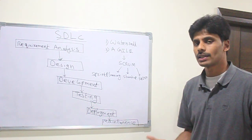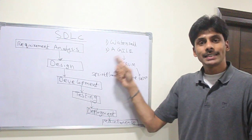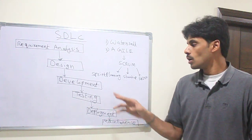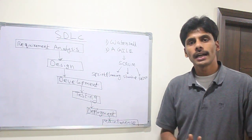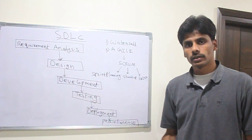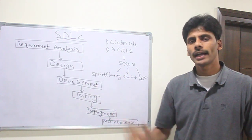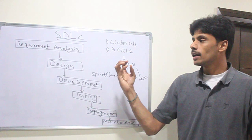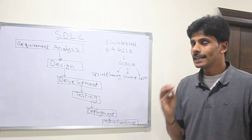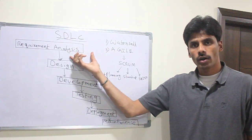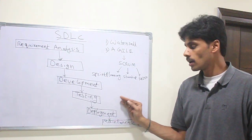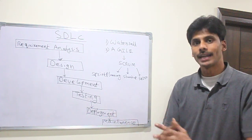There are different processes and methodologies in the agile approach. One famous way the industry is moving towards is scrum. In scrum, we have sprint planning — even before we start a product, we do a lot of planning and come up with the entire backlog for the product. We gather as many requirements as we can. Then in each sprint, which is a 15-day, three-week, or one-month period, we take a few requirements from the backlog, design and develop them, allow the QA team to test them, and even deploy them to the end user if required.